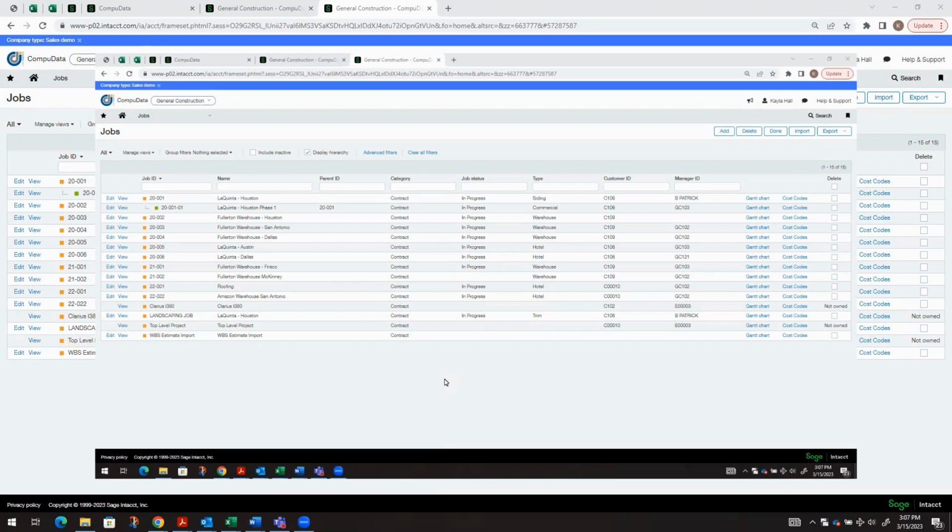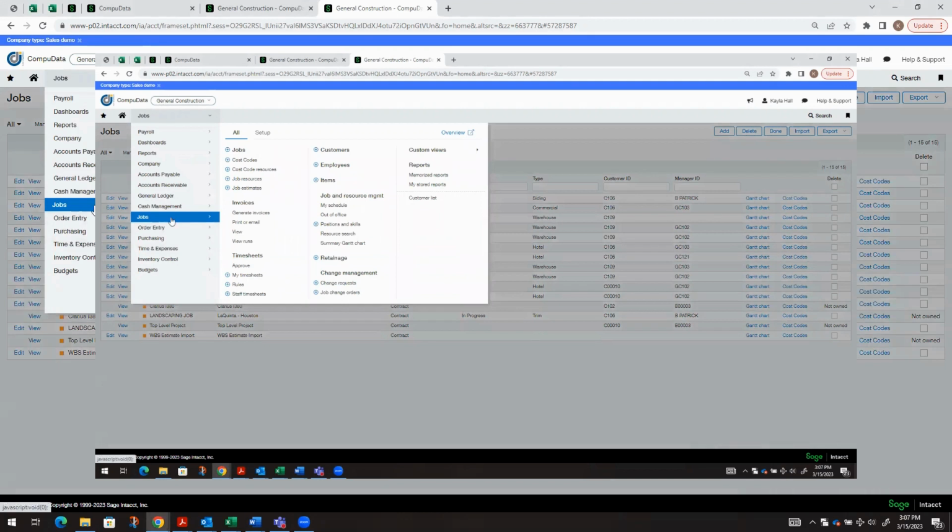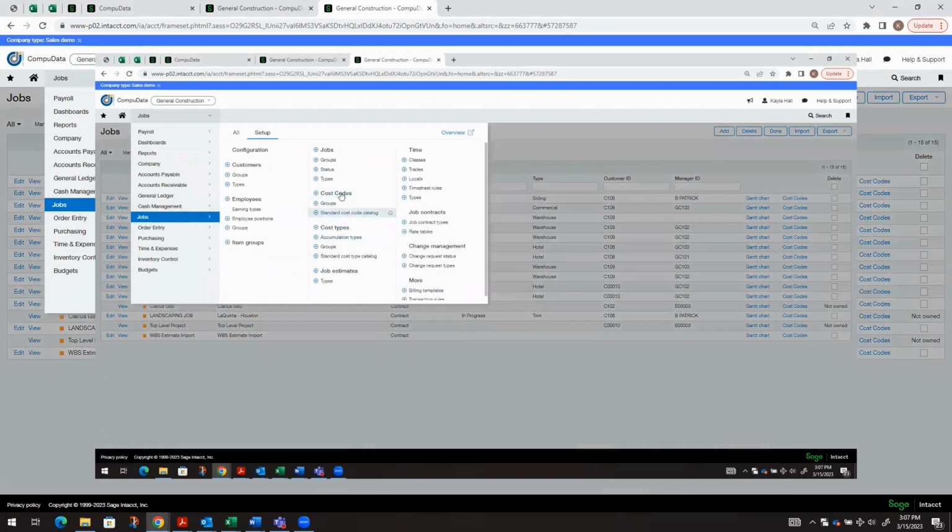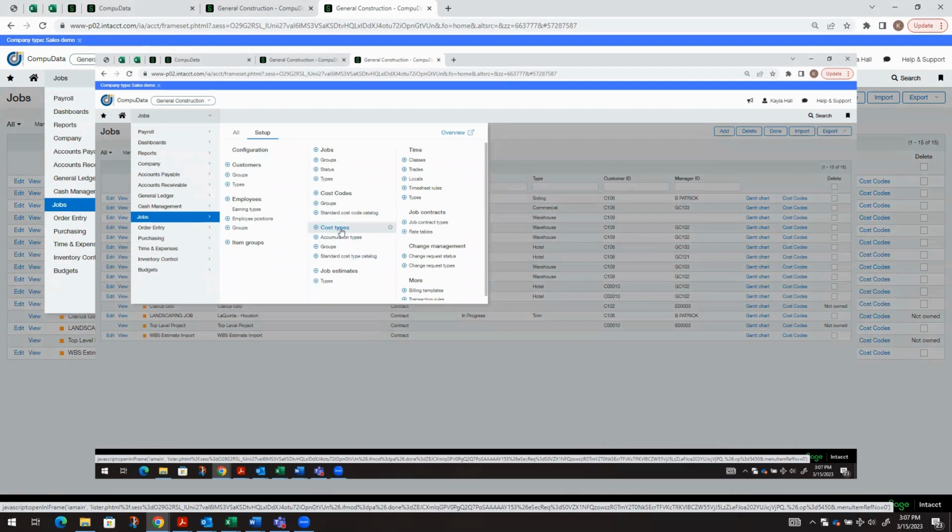Now we will review the work breakdown structure. A work breakdown structure represents project work in a visual hierarchy of manageable sections. The construction subscription enables the project, which is here, the task, which are also labeled as cost codes, and the cost types dimensions. While use is optional, you can't disable any of these dimensions once subscribed to CRE.